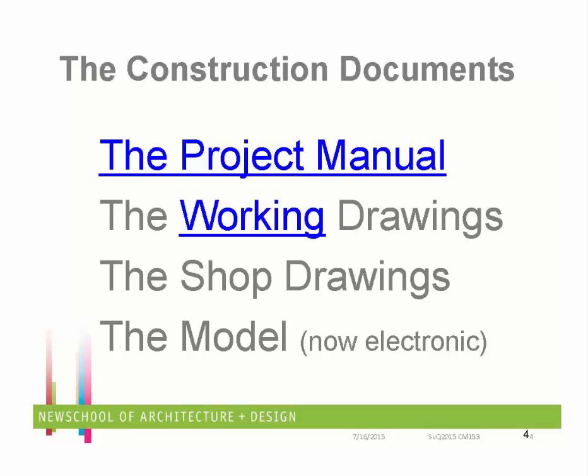What hardware set goes with it? Because I don't just back up and dump a truckload of hinges out. I send it to the job site boxed and identified for every door opening. So if I have this door called an A1 door and it appears on 20 floors, I'm going to have a box of hardware for it 20 times, each one identified to a specific floor and a specific location, so we can control the inventory for that.